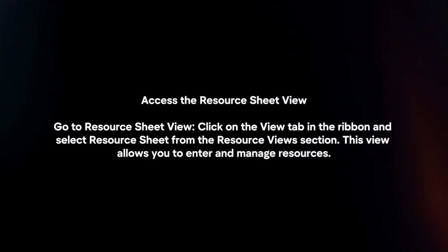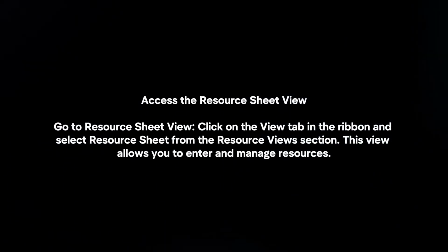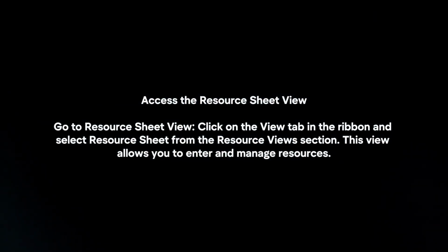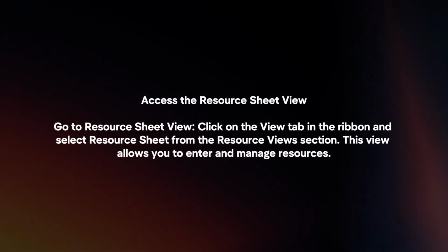Access the Resource Sheet view. Click on the View tab in the ribbon and select Resource Sheet from the Resource View section. This view allows you to enter and manage resources.